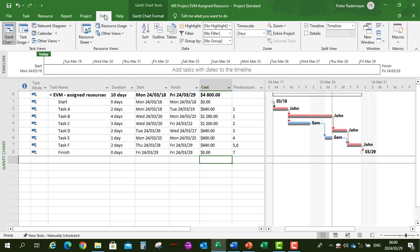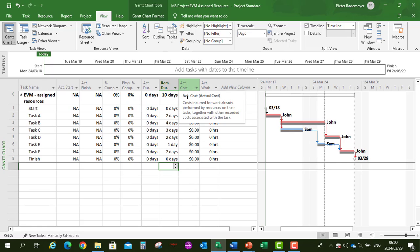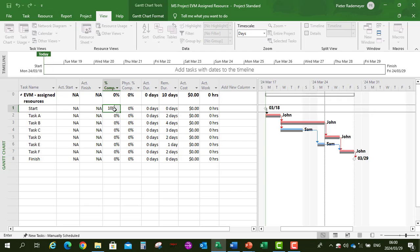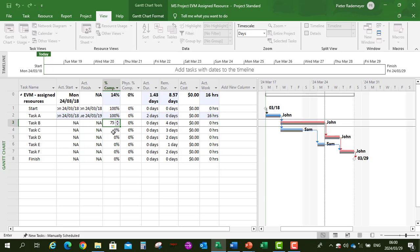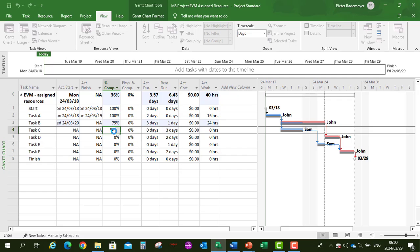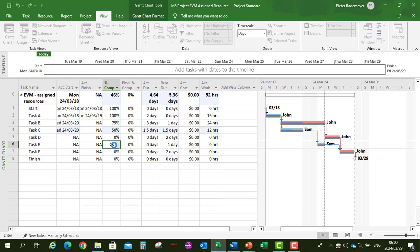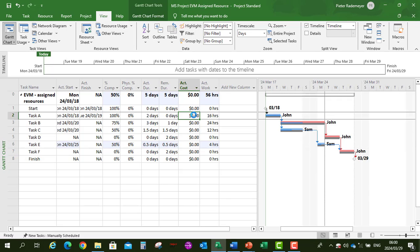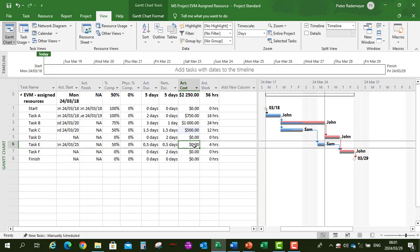Now let's add our progress to the project. Go to View, Table, and select the Tracking table. We're going to add the percentage complete: task A is 100%, task B is 75%, task C is 50%, and task E is 50% — all up until day 6. Then add the actual costs up until day 6: task A $750, task B $1,000, task C $500, and task E $350.